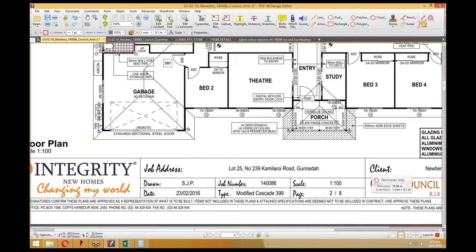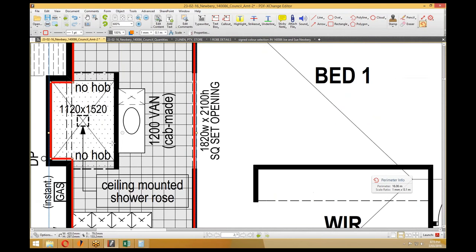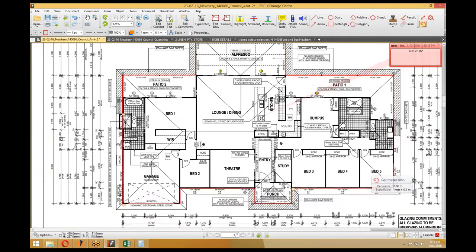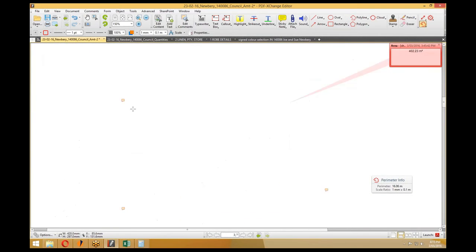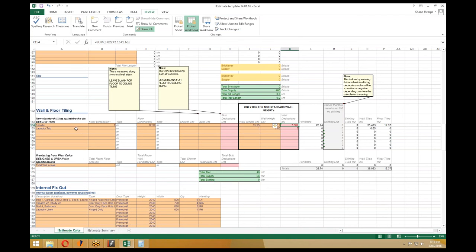Okay, so we've concluded that that area there does not make any allowance for this internal wall, which will also need to be tiled both, full height and sides. So if we have a look at that wall length, it's at 1.82. So we just go ensuite 2, and we would go 1.82 by 2.7.